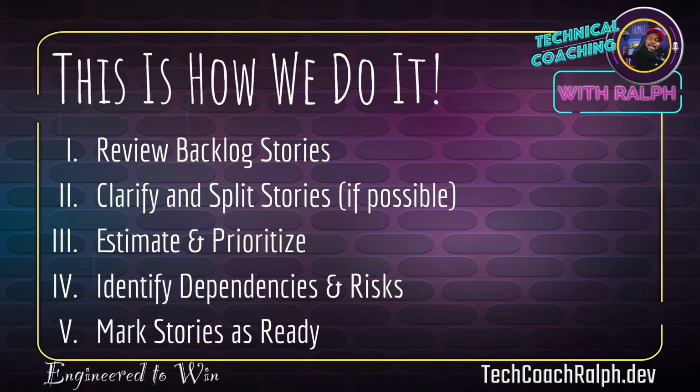And then once all of that is said and done, we mark the story as ready. Once it shows ready on the backlog, it shows that it can be pulled into a sprint, either the next one or the one after that, whenever that happens. But we mark it as ready in order to be able to get to work on it.